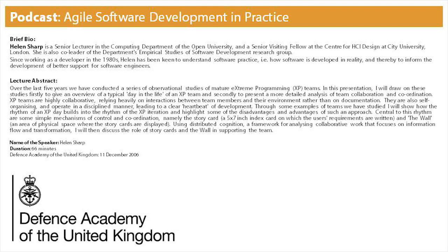They had a spreadsheet which had the company's overall view of the work and the customers and what had to be done for their customers. And that was linked to the workload plan row in the top right-hand corner. So each card had a number that related back to that spreadsheet. They had the story in the middle. Then the green initials and the estimates is what happened at the planning game.